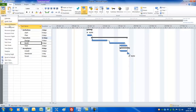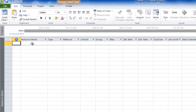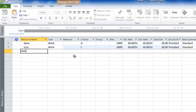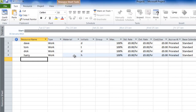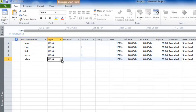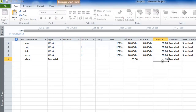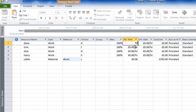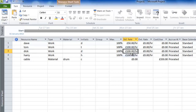Now let's set up the resource pool. Go to the Resource Sheet view and enter resources just like we did for tasks. We'll have Dave, Tom, Dick, and Harry. To show non-human resources, we'll add 'Cables' set to Material type — materials don't have calendars. We'll give it a cost per use of £350 and a material label of 'Drum'. For Dave, Tom, Dick, and Harry we set costs: Dave at £50/hour and the rest at £100/hour.